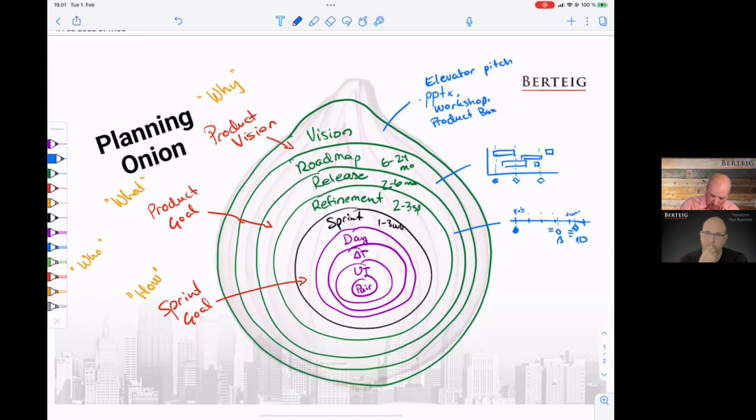So they might give me, okay, so these are the critical things we want to test in there that we need to get ready. And then they might say, we also want to do an alpha, sort of an early demo, and we want to ship that somewhere in March, April, before Easter holidays anyways. So we might say that's an alpha. So what do you want to prove there? And again, they might say, these are the critical things that we need to show in that. And bingo, we have a roadmap or release plan, really. Sorry, not roadmap, that was a high level, but we have a release plan.